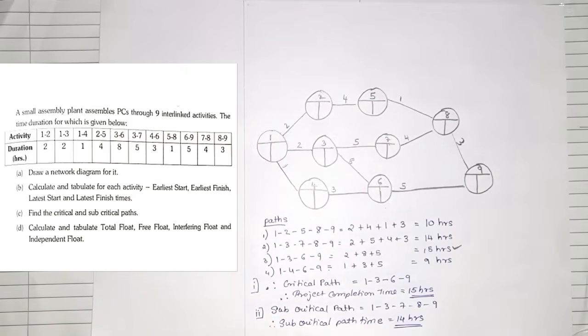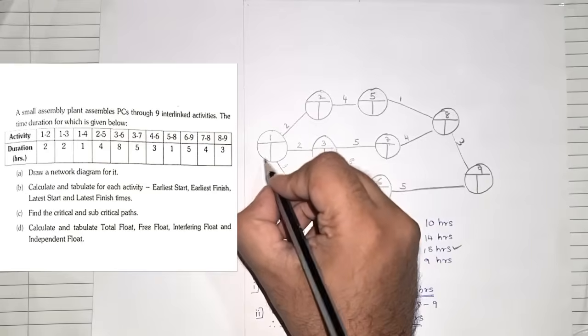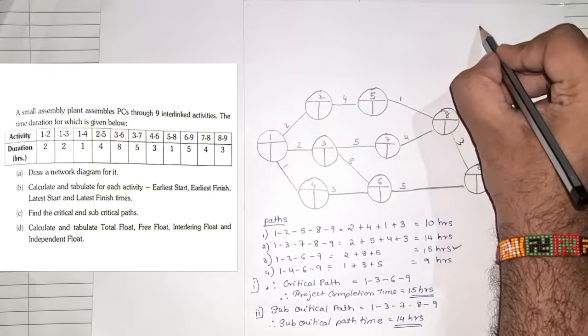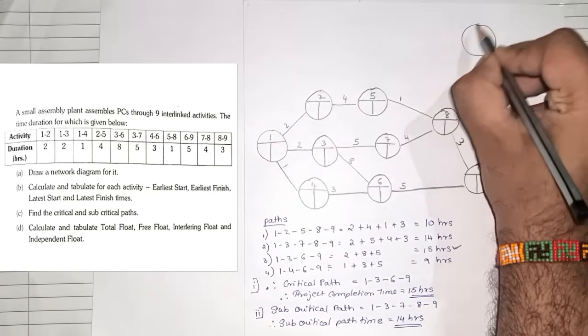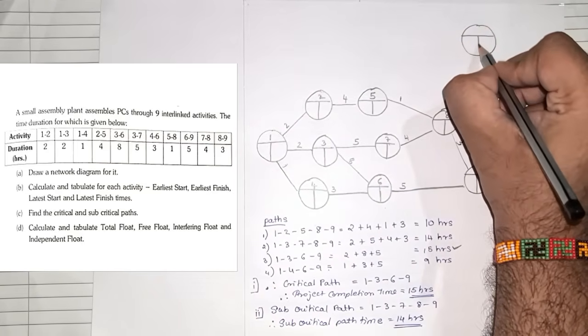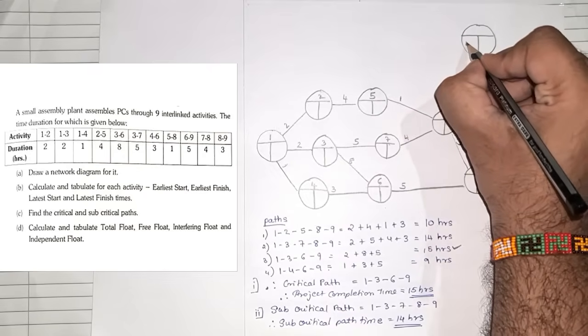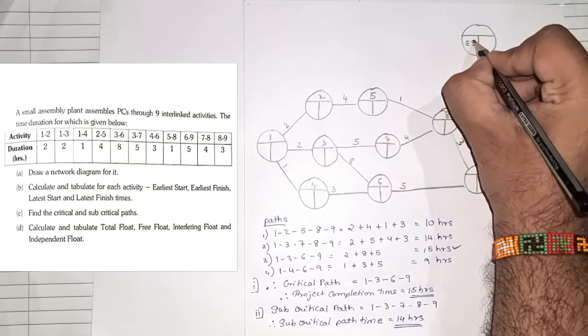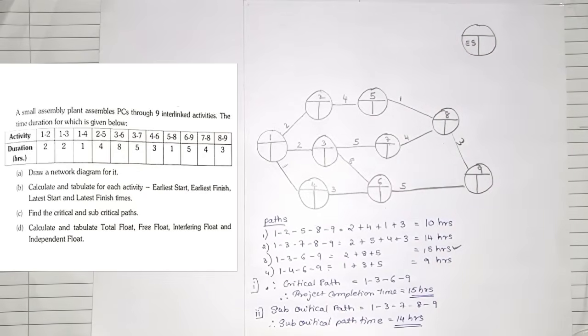Okay, look at this very carefully. You will always start, now this is the first part. Remember when we make this 0, on top we have written the name of the activity. This is your earliest start time. That value is nothing but your earliest start time, the first part, meaning the time at which your activity can start at the earliest.